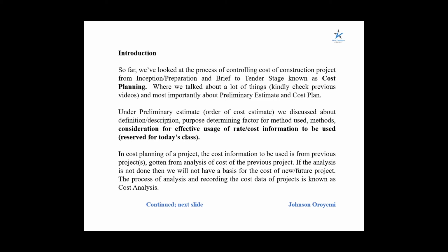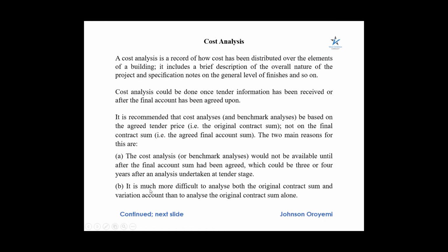So the process of analyzing and recording the cost data of a project is what we know as cost analysis. Cost analysis is the record of how cost has been distributed over the elements of a building. It includes a brief description of the overall nature of the project and specification notes on the general level of finishing.